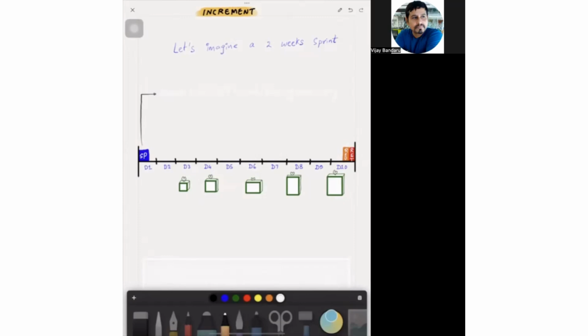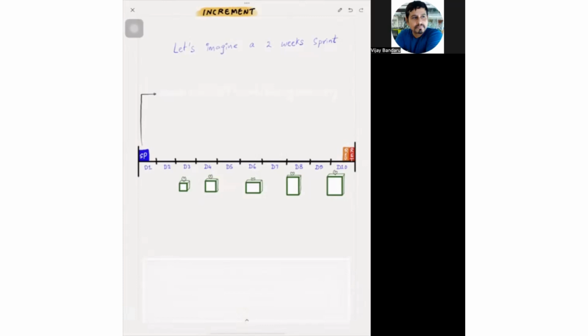According to the Scrum Guide, maximum 4 hours for sprint review for a 1-month sprint, shorter for shorter sprints. Retrospective, 3 hours maximum for a 1-month sprint and shorter for shorter sprints. So first half day planning, last half day review and retrospective. So let's imagine in the sprint planning, the developers have selected these items into the sprint backlog, which was prioritized by the product owner: search, list, add to cart, changing the shipping address, and payment using any approach.